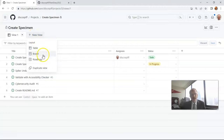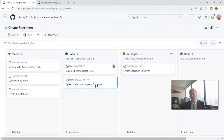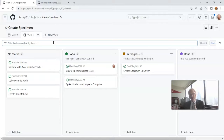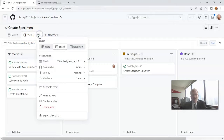I can choose New View and choose Board. This gives us a very traditional scrum board with the ability to drag and drop as we often do. The filter up here is really handy — if you want to filter by certain text or by assignee, that can make stand-up go really quickly. You just filter by the assignee, and each time it's somebody's turn, you filter by that person, and they can immediately see what they worked on. Sometimes in stand-up, no matter how well you prepare, when it comes to your turn you get a bit of brain-freeze, so it's helpful to have a quick reference right there. That is the board view.